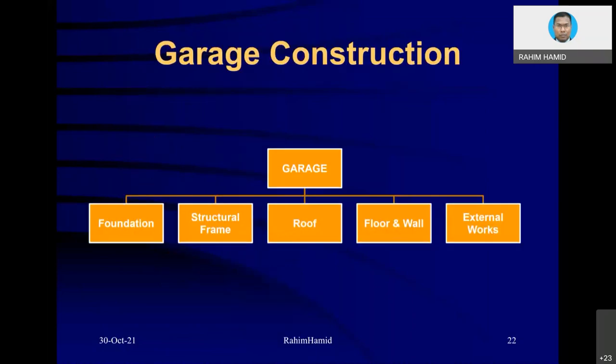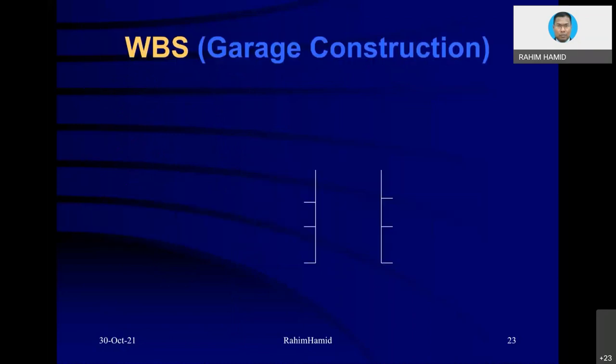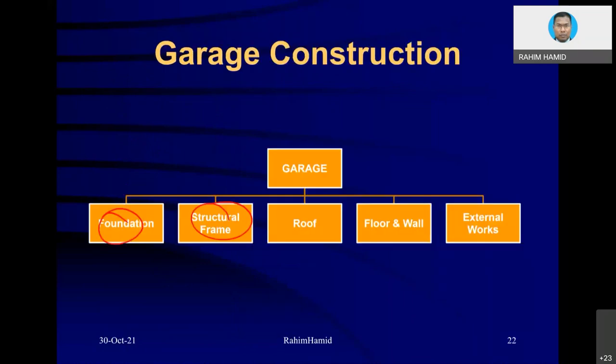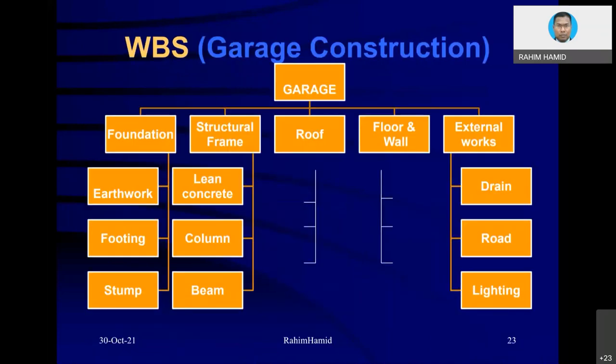Okay, let's take a look at a simple construction, a garage, or tempat you simpan kereta. So easily you can split between structural elements: foundation, structural frame, roof, floor and wall, external works. And then you can split further under foundation: you might have earthwork, footing, a little bit of stump, and structural work, lean concrete, column, beams. Even roof, you might have a few elements, the roof truss and things like that. Floor also the same, external work like that. Okay, so if you can draw something like this, this is what we call WBS, and each of these items here